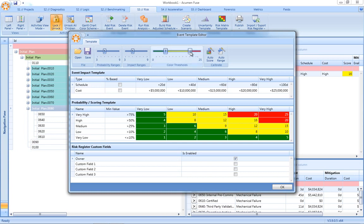In addition, Acumen Risk has a unique capability for automatically defining the ranges or the buckets based on the size and scope and cost of the project against which we're running our risk analysis.